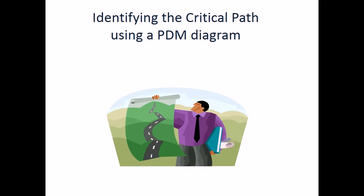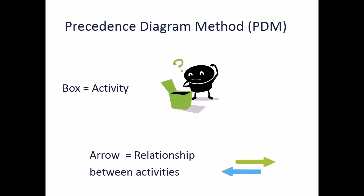In this podcast we will look at identifying the critical path using a PDM network diagram. PDM stands for Precedence Diagramming Method. In a PDM diagram the box represents the activity, and the arrow represents the relationship between the activities. PDM is the most commonly used network diagramming technique.